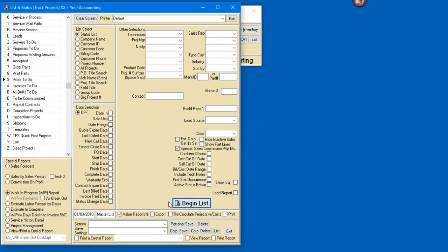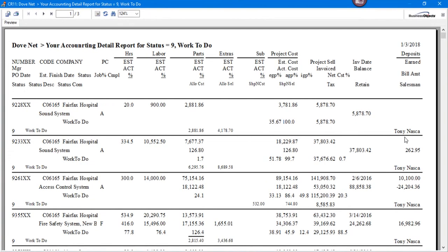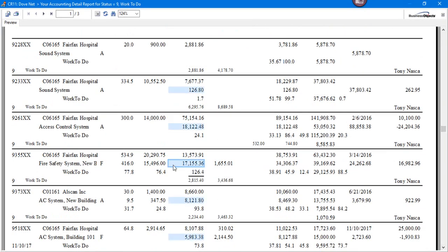And if we take this one level further, we can click over here on this guy like so and look at that same project. And we notice some interesting things fall out of that particular project. Right here, something interesting we didn't see on the first report, but in a little more detail, we see an interesting phenomenon. Labor hours are doing good. Our labor cost is doing good like so, but our equipment is whacked out. So we have a little extra cost against this. Maybe we forgot something. We went over budget on our hardware side. And oh, by the way, we had that crane rental. So some interesting things fall out if we explode this one level deeper.